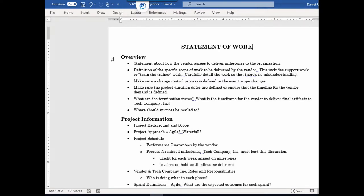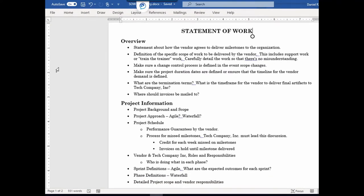First, you're going to have your overview section on the Statement of Work. Basically in this section you're going to have components that include a statement of how the vendor agrees to deliver milestones to the organization. You have to define your acceptance criteria — in our case, how will PMO Tools Inc. deliver their software? Are they going to deploy it to a certain environment where users have access to it? All of these items have to be defined here.